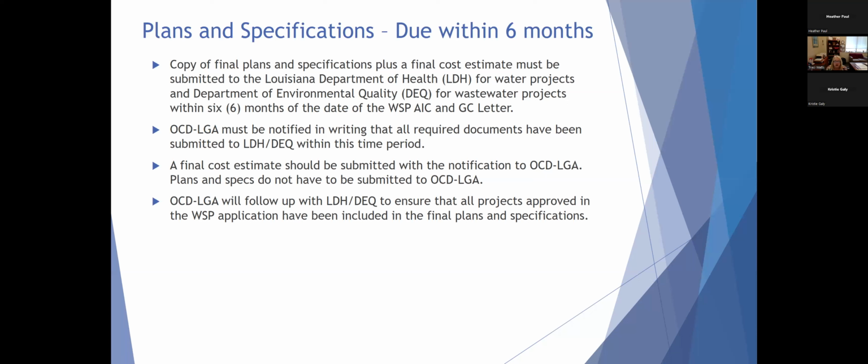We must be notified in writing when you have submitted all of the documents to the cognizant agency and that you've done so within our time period. Remember to include a final cost estimate to our office with that notification. You do not have to submit plans and specs to our office. We will follow up with LDH and DEQ to ensure that all projects approved in the water sector application are included in the final plans and specifications submitted.